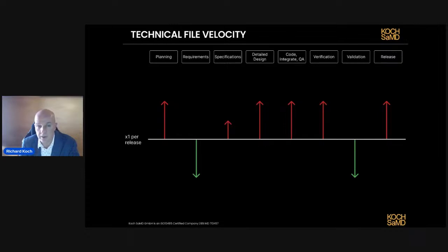So in my view, your plan needs to be updated at least once per release. If you're doing fast development cycles, you really don't have time but to do it once per release. An example of that would be, in terms of your traceability and validating your tool chain for your release. If you, for example, have preset filters for your Jira, which generate traceability reports, you need to update those filters, you need to validate your tool chain. All that has to happen once per release.